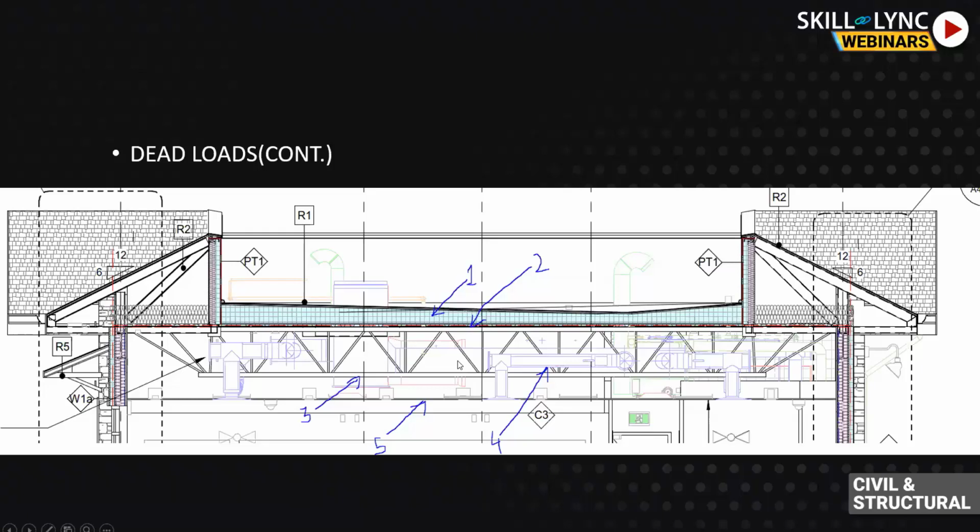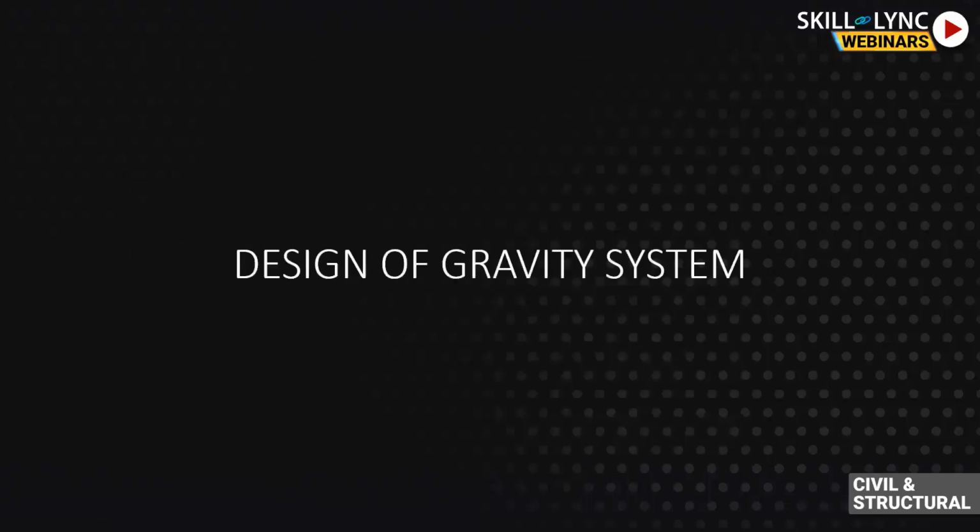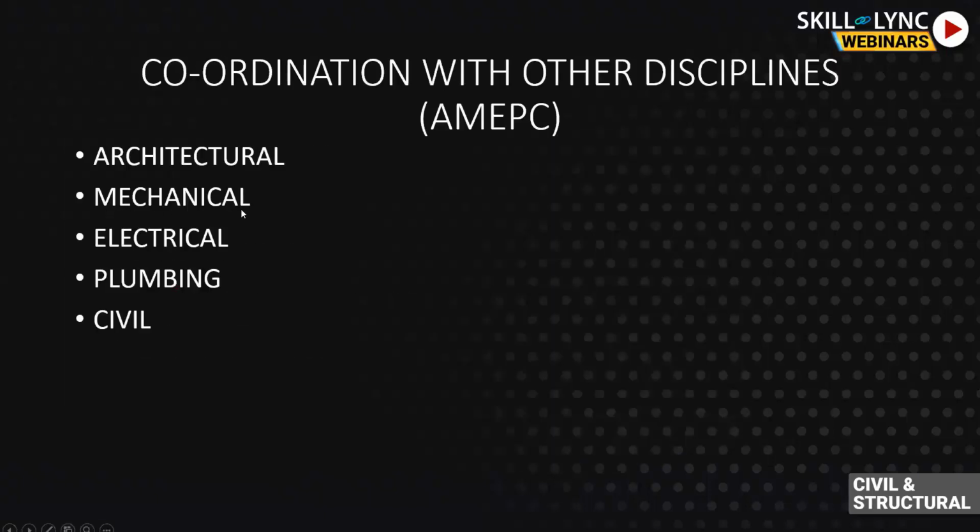To show this example, this duct is going throughout the length of my building. It's spanning from this side all the way up to this side, or maybe somewhere in between it is stopping. So mechanical guys need to coordinate that it's not clashing with any of my structural elements. If it does, on site, it's creating some lag. It's creating some kind of stopping on the site, some questions on the site, and you don't want to have all your labor force and all your material sitting idle on the site to answer these kind of questions. So we try to sort out